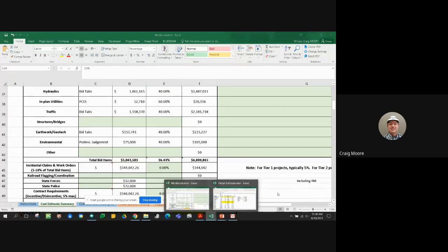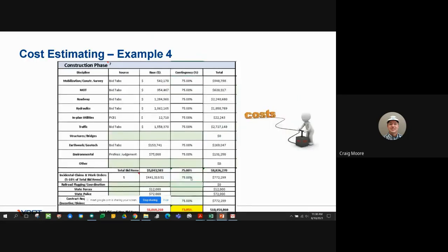One of the things in going through that aspect there is, we did come up with a more refined sketch than that earlier sketch. Let's say we did not go through that extra effort to work through better defining those risks and understanding the project, and took that initial thing. Again, this is just a quick way of looking at it, but basically taking the same price. We may have had different base prices, but applying a 75% contingency, which is what Alex was showing in his earlier presentation coming out of the estimating manual, now we're up around $8.8 million in terms of our estimate.